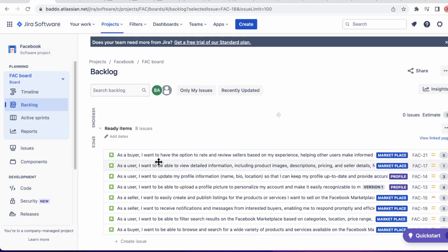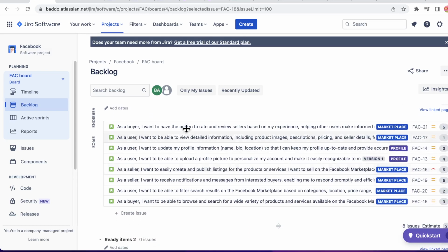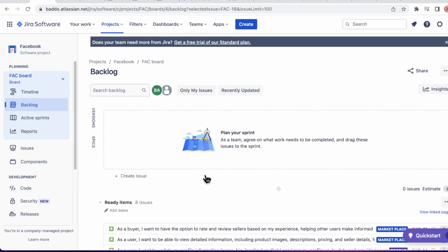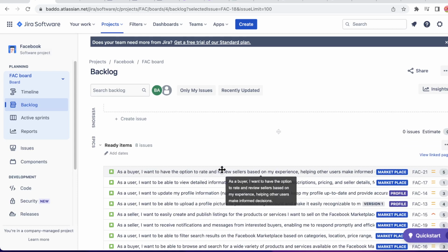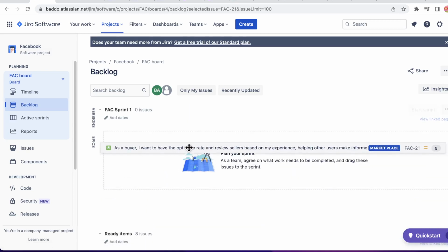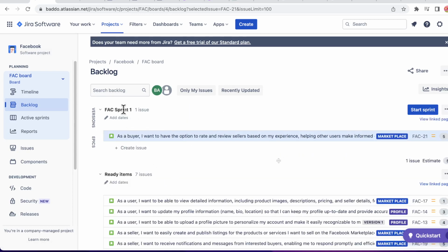Let's look at this. Let's say we have these as the prioritized user stories, okay? And then the velocity is, say, 15. So what we'll do is, in order of priority, we can pick this one. It has a user story of 5. We pick it, and then we take it to sprint 1. So we have 5.